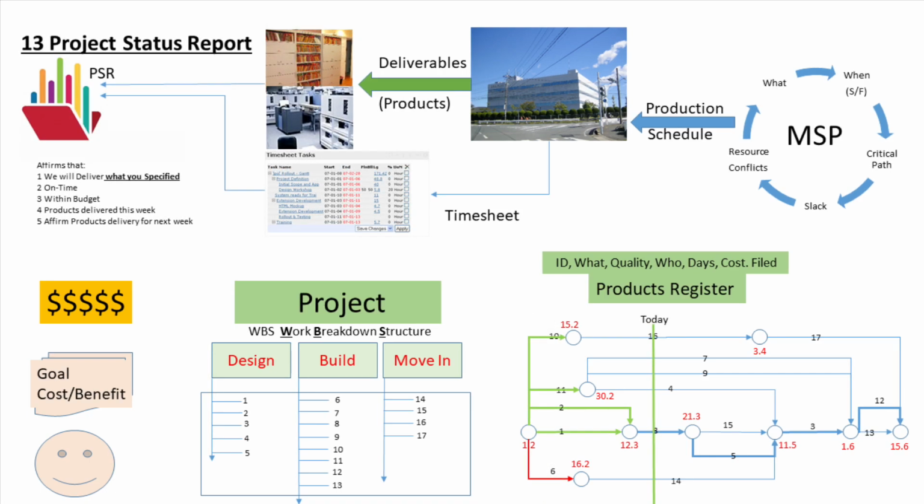For every project report, the key questions to be asked and answered are: 1. Will we be finished on time and within budget? And number 2, will we get exactly what we specified? And number 3, where are we now? And the first 2 are very clear, so just answer them for your project.